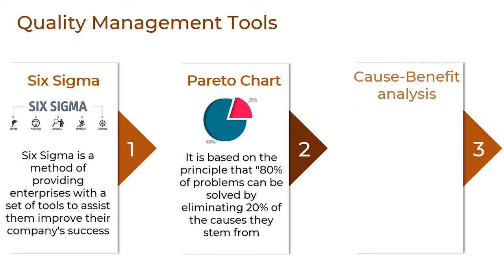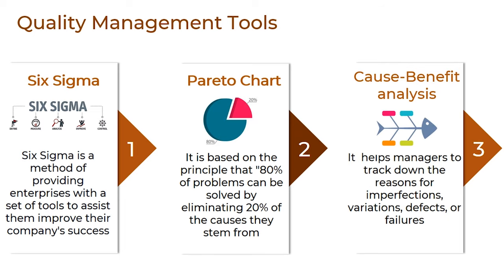Then, cause-and-effect analysis. The fishbone diagram is a cause-and-effect diagram that usually helps managers to track down the reasons for imperfections, variations, defects, or failures. Thus, it is also called the Ishikawa diagram. The diagram looks just like a fish's skeleton, hence the name. Here, we write the problem at its head and its causes feeding into the spine. Once all the causes have been identified, managers can start looking for solutions to ensure that the problem is not recurring.